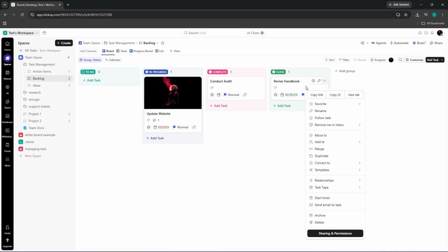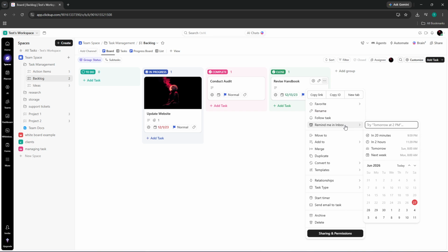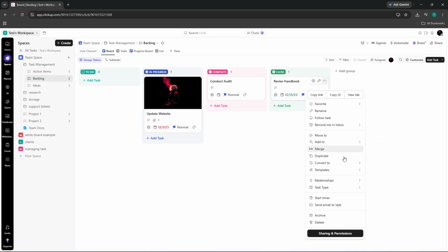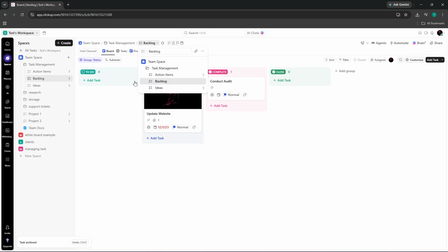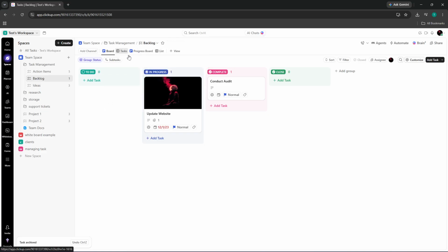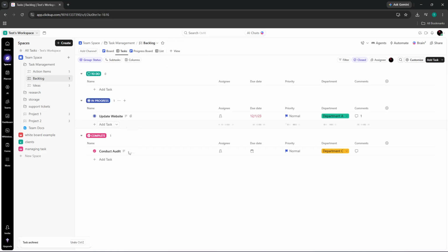Use comments and @mentions to document decisions and bring stakeholders into the conversation, keeping every relevant discussion attached directly to the work itself, rather than buried in email or chat. Finally, monitor backlog size over time. A backlog that grows without being pruned becomes unmanageable, and an unmanageable backlog gets ignored. Update priorities as business needs shift, keep refining items until they are genuinely implementation ready, and archive anything the team is unlikely to tackle in the foreseeable future.